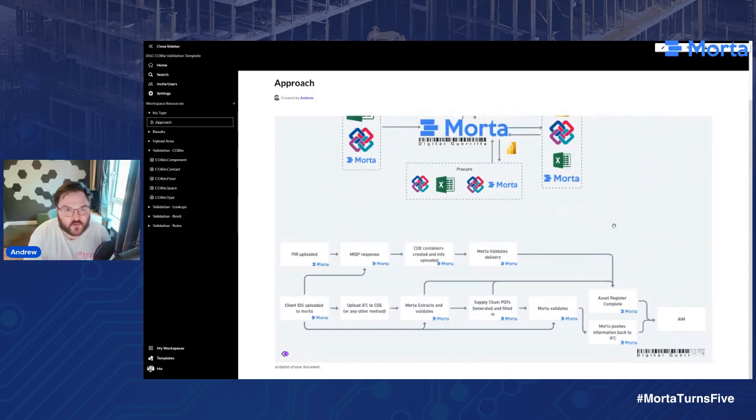So there's two sides to this: the project information requirements and the asset information requirements. As Pavel touched on in the past, we've got PIRs integrating into master information delivery plans, which can then potentially generate containers within Viewpoint or AConnect, track that, and validate it all. Alongside that, we have our information delivery schedules from the client. They upload information there that's then used to validate against any other information that's uploaded, IFC for example, or even just the Excel.